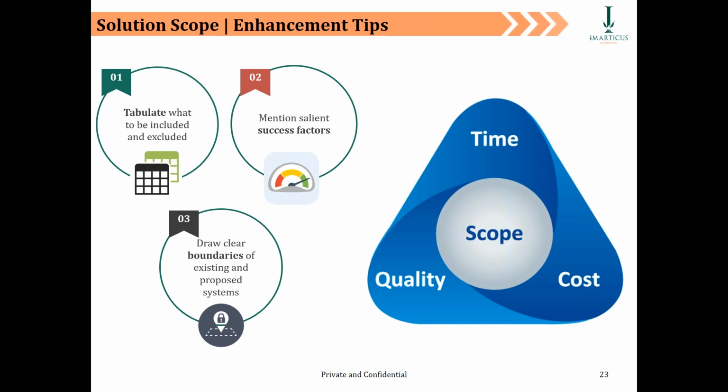What needs to be excluded is not part of the scope. And then what is the business reason for including only the high value purchase orders to be automated? Because of the high value of the purchase orders, if there is a certain error, it leads to a large business damage. Okay, so in the first release of this project, we will automate only the purchase orders which are beyond 10 lakh rupees. Okay, so everybody doesn't approve purchase orders of more than 10 lakhs, right?